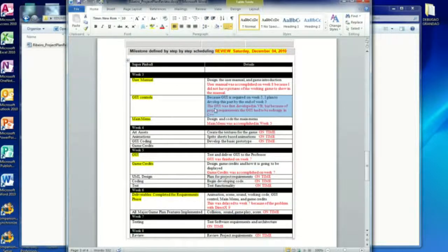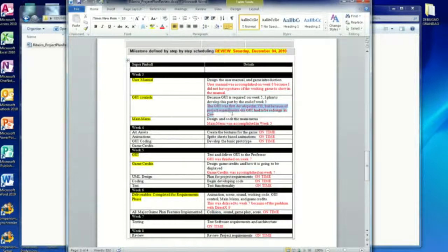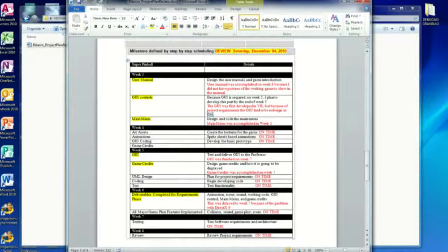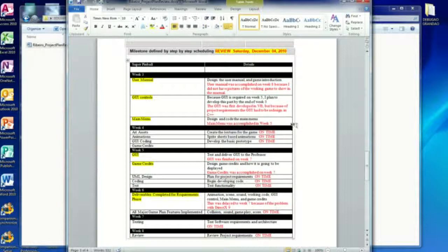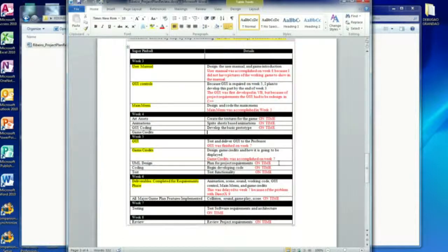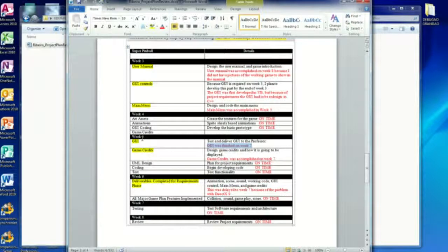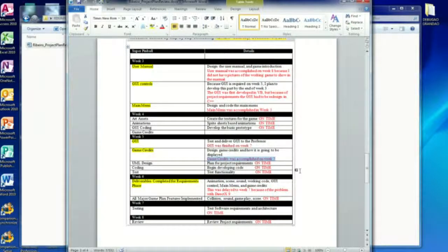The graphic user interface, I started to code it in Visual Basic, but the professor said he wanted everything on C++. So I had to basically start all over this part. The main menu, instead of accomplish it on week 3, was actually accomplish it on week 5. Week 4, everything was on time. The graphic user interface was actually finished on week 7 instead of week 5. And also the game credits, because of the Windows form.